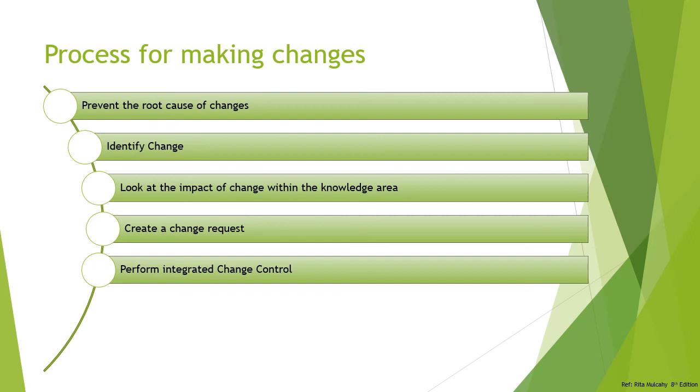Also, there can be a change which you have already considered while identifying the risks, for which you have already considered the reserve while you identified it as a risk. So such change requests should not be considered for the integrated change control process.